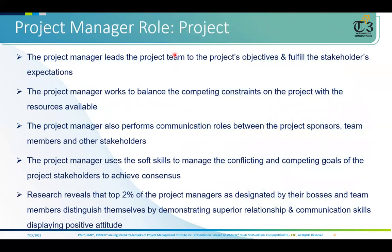The project manager's role towards the project: rule number one is to achieve project objectives and fulfill stakeholder expectations, because project requirements are stakeholder needs and expectations. While doing so, the PM must balance constraints — scope, schedule, cost, quality, resource, and risk (STC QR). If one constraint is out of balance, it will disturb the others. He must balance constraints and maintain communication to keep stakeholders informed and engaged.